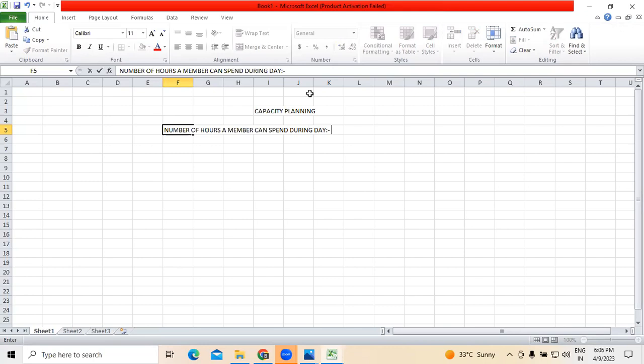Yes. But what are the productive hours? 6 hours plus. Right, 6 to 6.5. Why? Because the remaining 1.5 hours will be for breakfast, lunch, and other meetings. At the same time, there are daily scrum meetings as well. So that 6.5 hours is what I am giving.